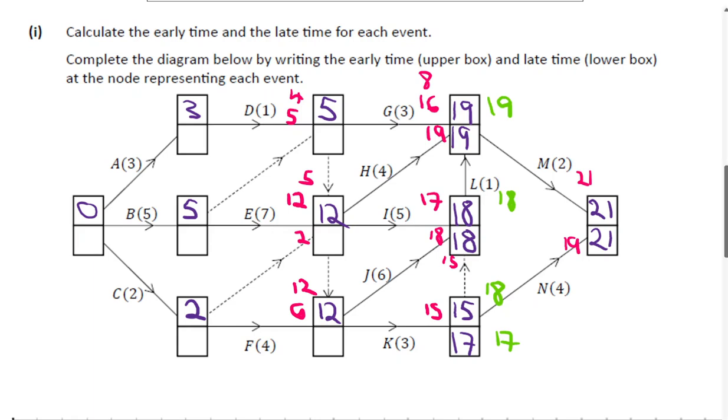So I suppose now we look at the top and see this thing here. So what's happening here? We know 19 minus 3 is 16. So that's one possibility, but as before, we have this arrow leaving here. So we have to deal with the middle box before we can deal with the top. So we have to deal with the 12 before we can deal with the 5.